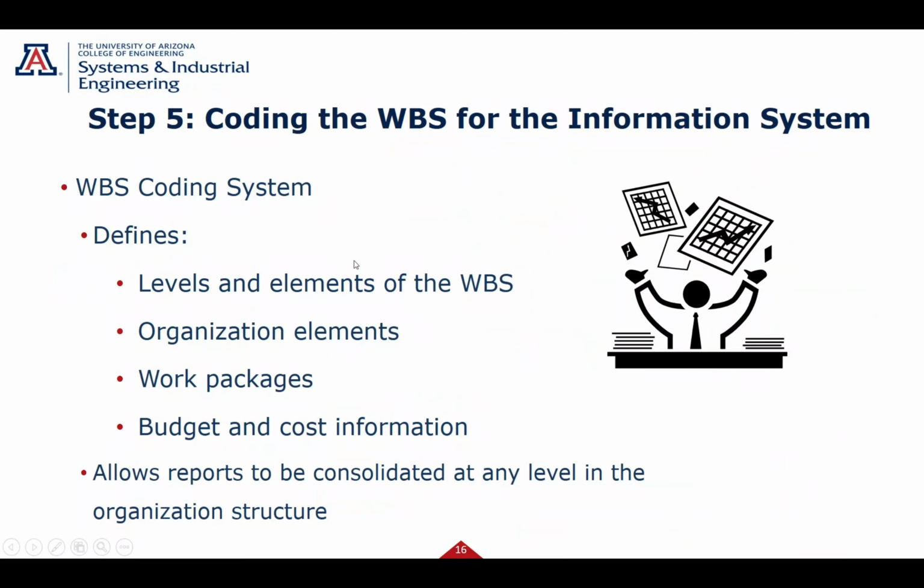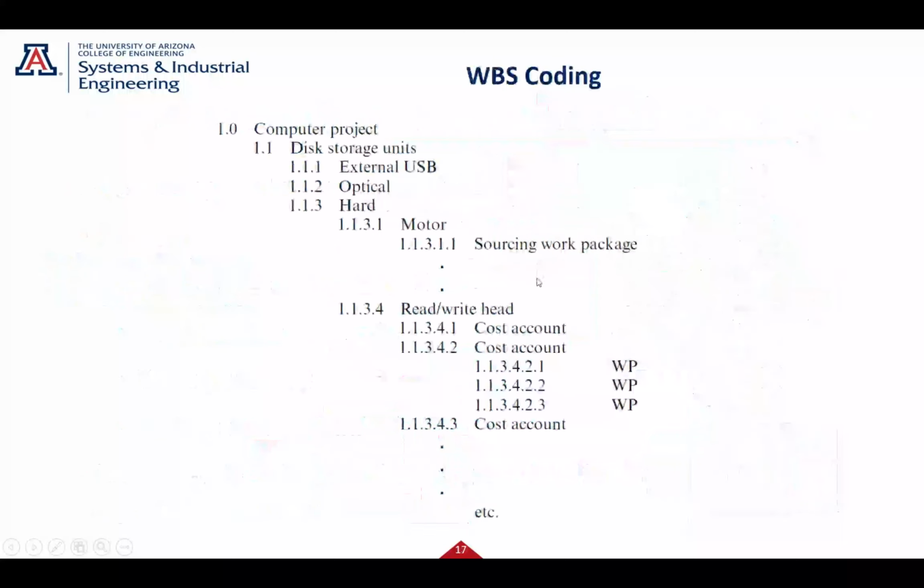So now we define the coding, which defines the level of the elements and so forth. And that was this coding that we showed back here, but I think it's easier to look at it as you're indenting it. Computer project, disk storage, it's broken down into these pieces. The hard drive's broken down into the motor and the read-write. That motor is broken down into another level. So now we're taking these down and defining these levels here, and that's what's called the coding.